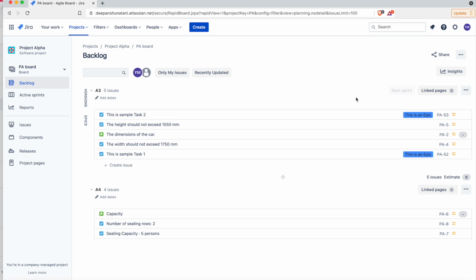In Jira Software, the Manage Sprints permission allows a user to perform actions like starting or completing sprints. In order to be able to start or stop a sprint, a user must have the Manage Sprint permission in all the projects which are returned by the filter query applied to the board from which the sprint originates. So the first thing we need to do is to check the filter query which is applied to the board from which this sprint originates.